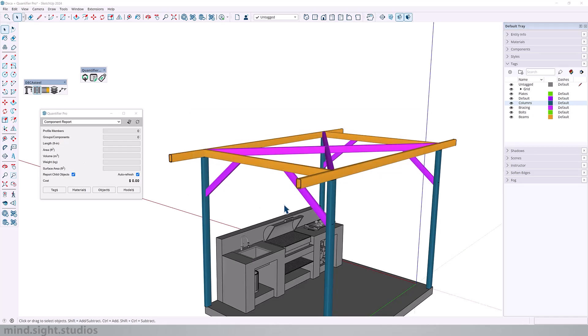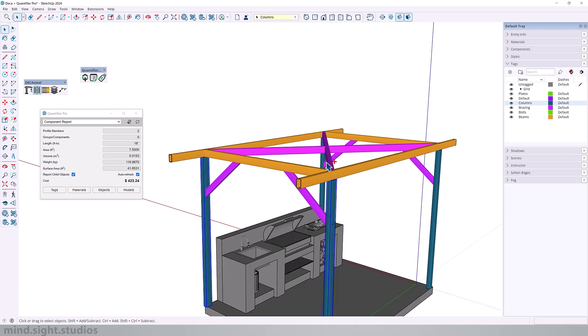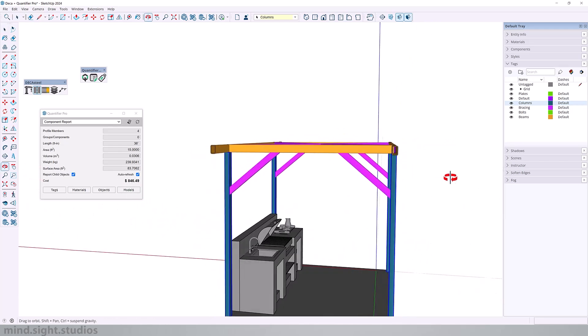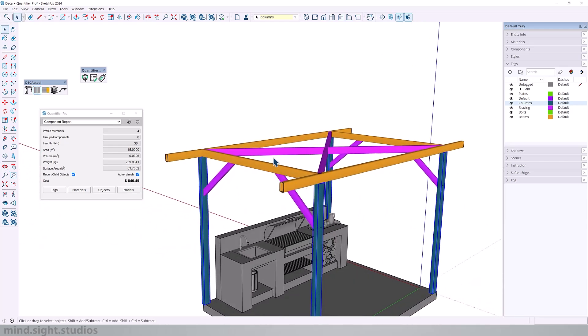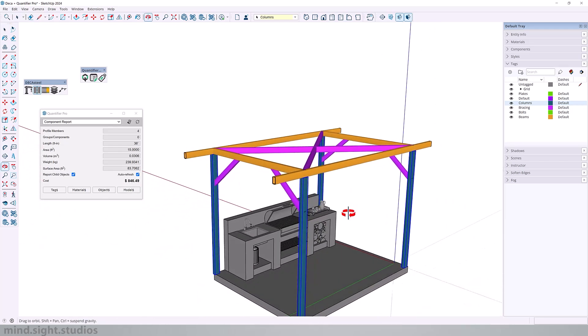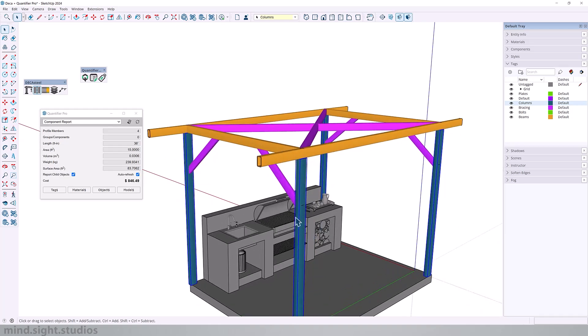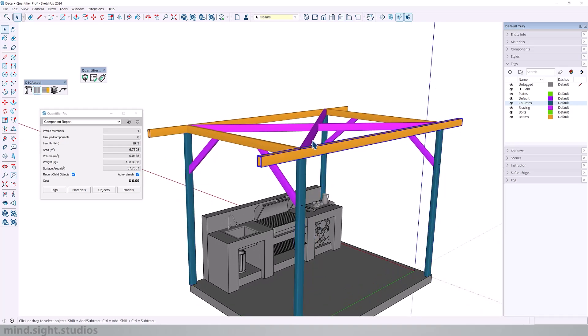So now when I select my column, you can see that it has a price of around $211. If I select all four, it gives me a cost of $846. So the same way we added the price item for the columns, we do the same for the beams as well as the bracing. And we can then calculate the cost for this entire structure.